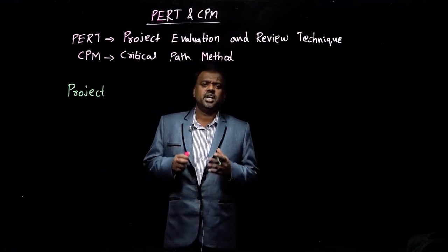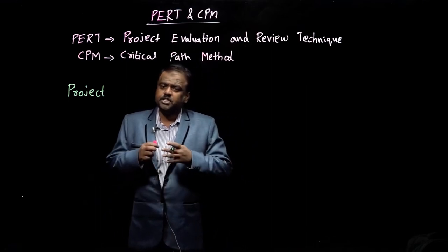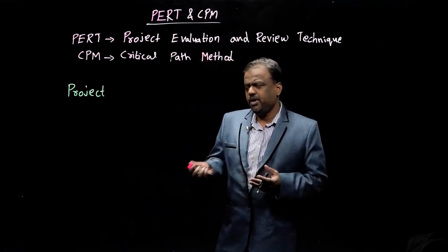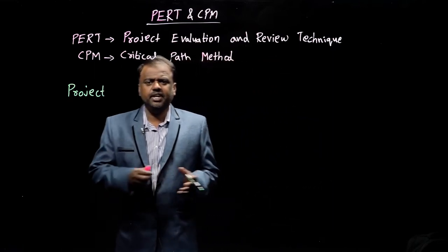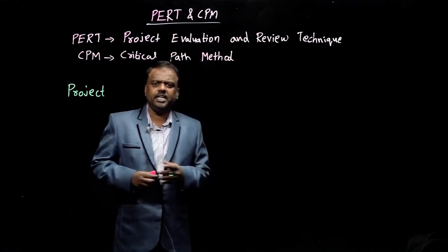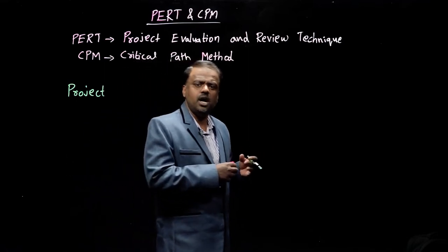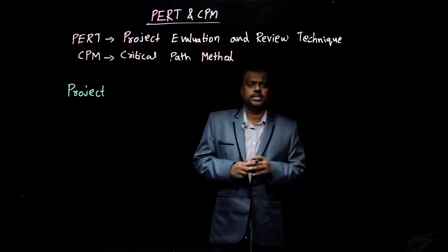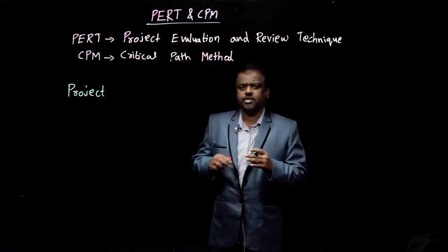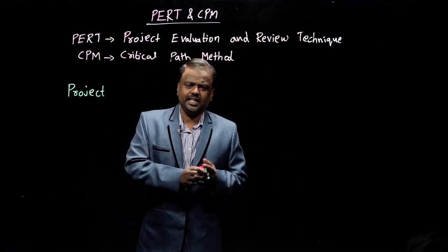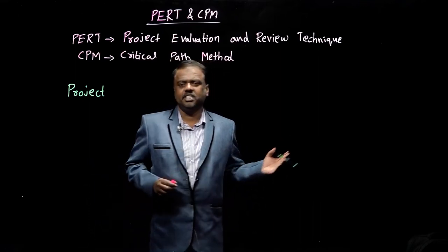It is a combination of interrelated activities which must be executed in a certain order before completing it. It may be your academic project, or if you are working somewhere, your working project, anything. Suppose manufacturing a component is your project. It can be divided into some activities like design, fabrication or manufacturing, assembly, testing, results.